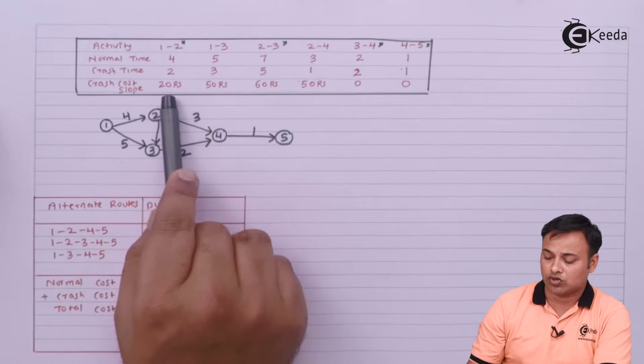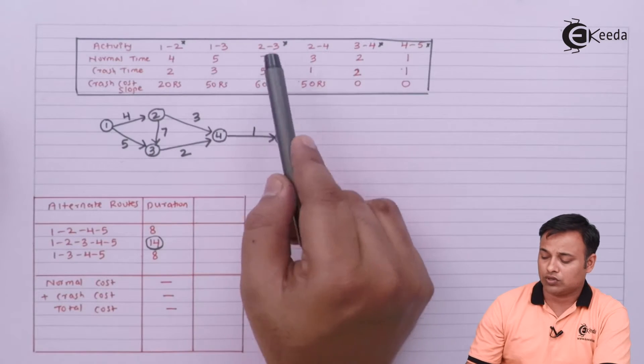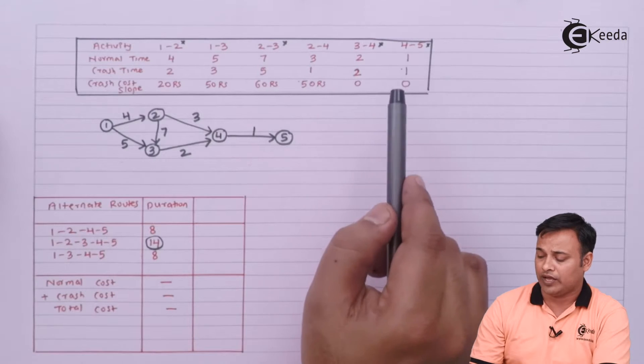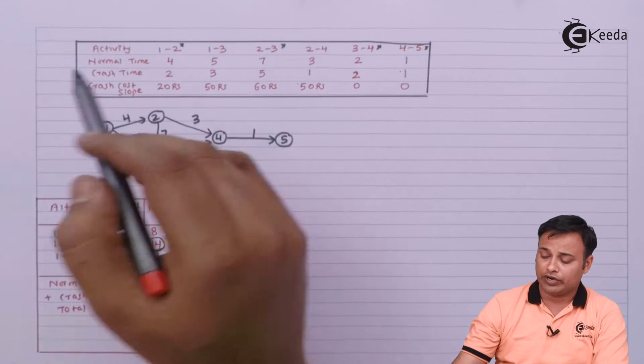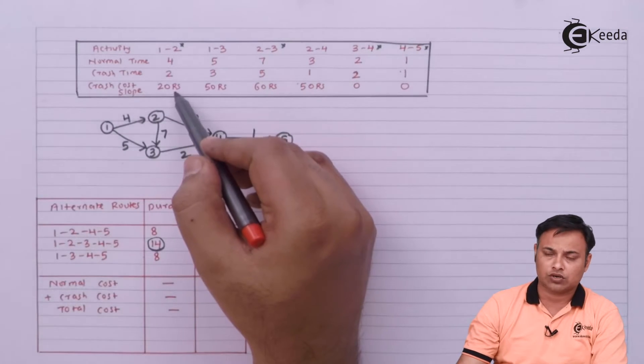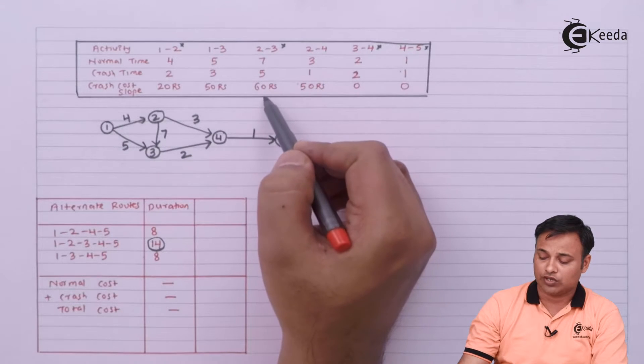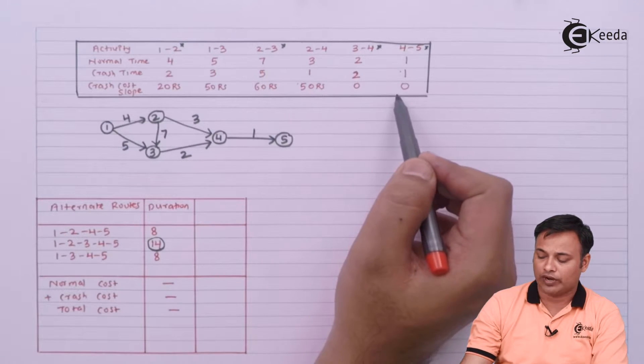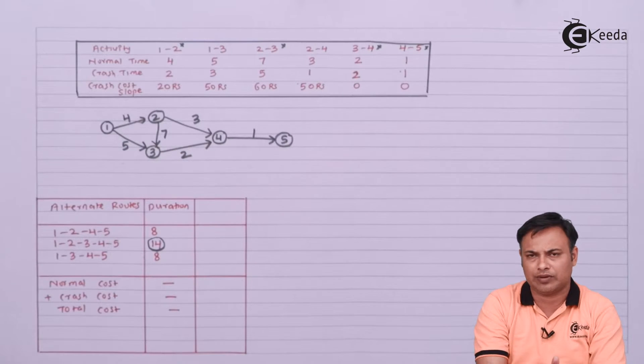Activity 1-2 has crash cost slope 20 rupees, 2-3 has 60 rupees, 3-4 is 0, and 4-5 is 0. So we have 1-2 with 20 rupees crash cost slope and 2-3 with 60 rupees. We can't do any crashing on 3-4 and 4-5 because crashing is not available there.